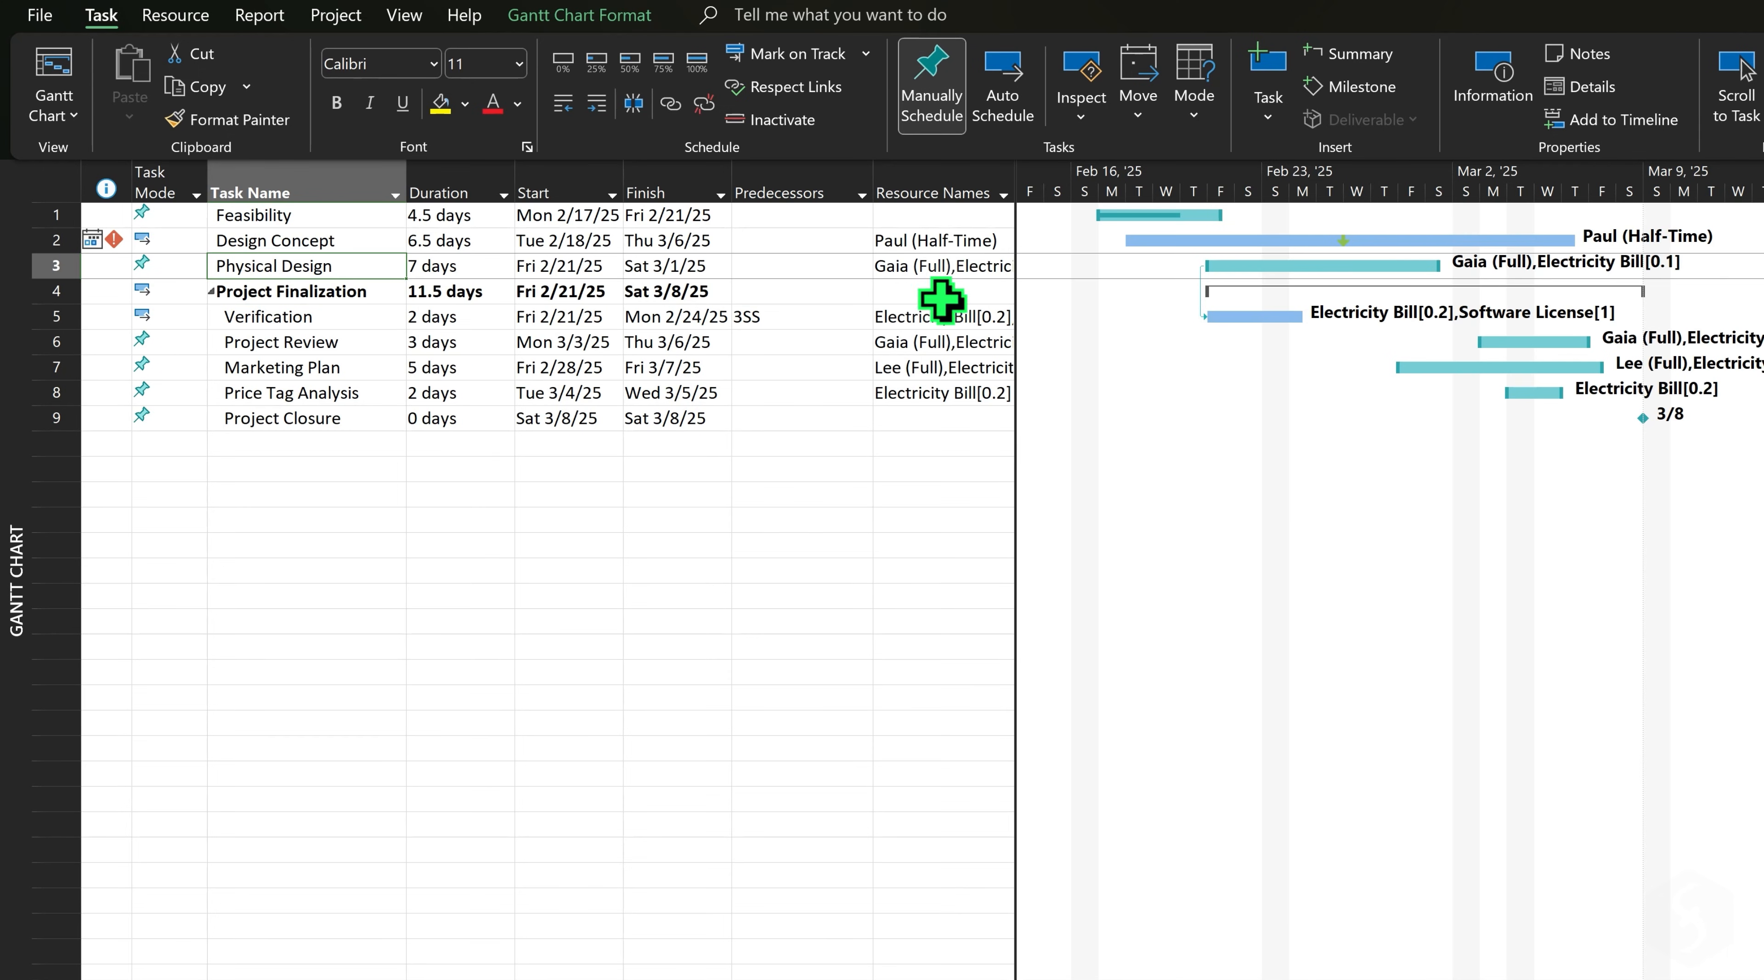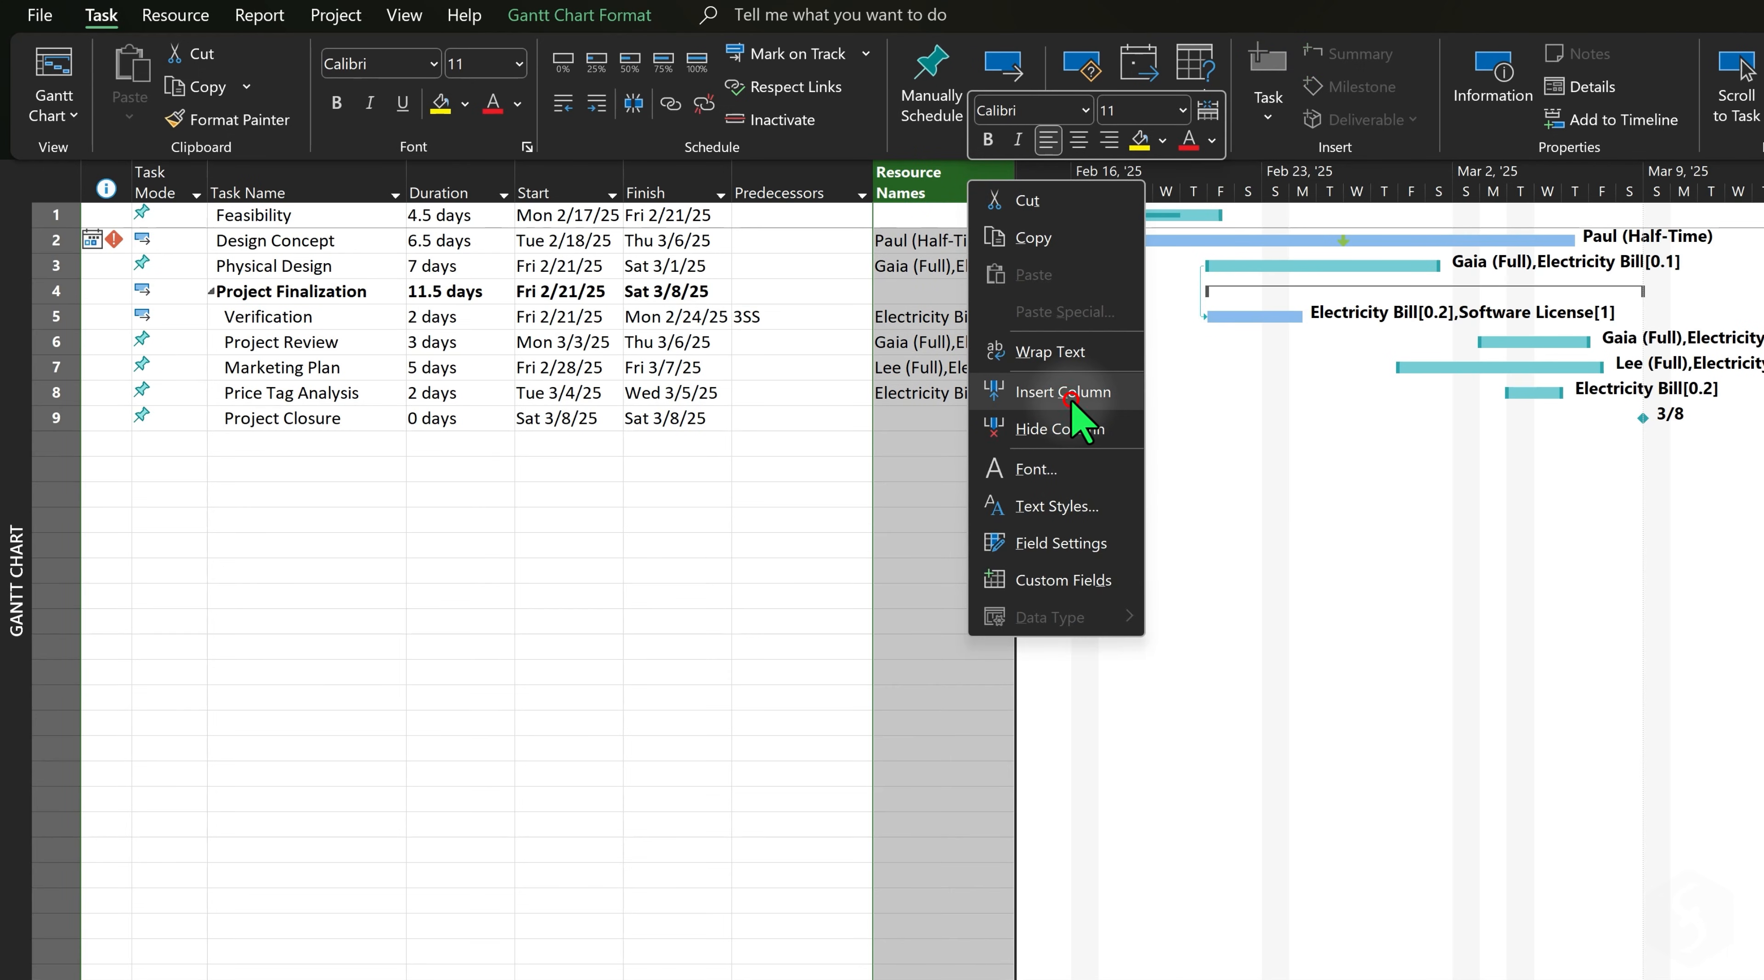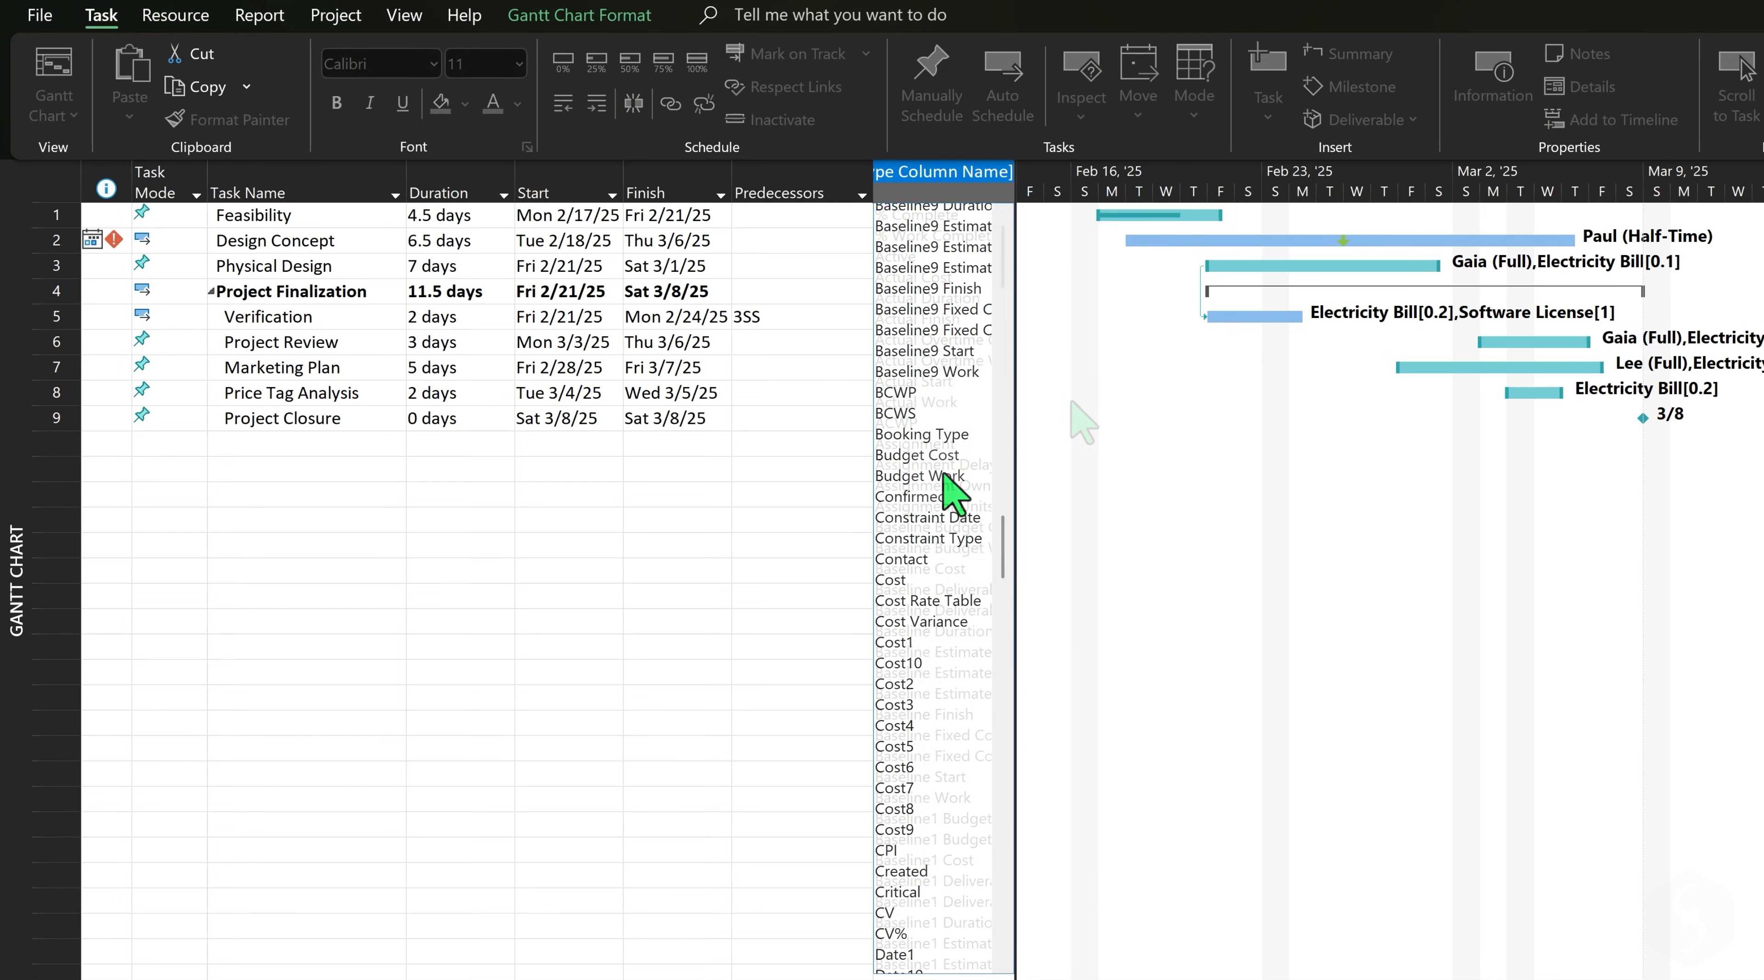You can also show the total cost of each task by showing a new Cost column.